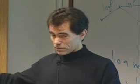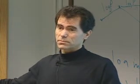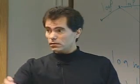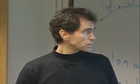So when I have a problem in integrated testing, guess what? The whole spacecraft stops until I fix this box. So if you can, try and do it so that you've got enough margin that you can test at the small box level before, in parallel with all of the other boxes, before you get to integrated testing.